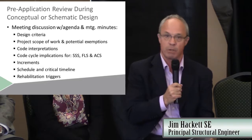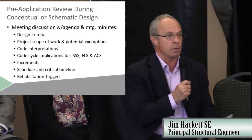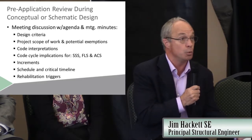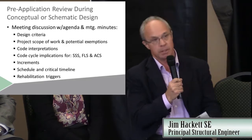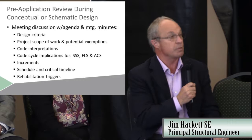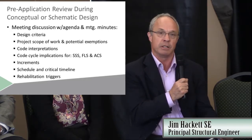Jim, do you want to explain the difference between the administrative and the technical side for some folks that don't understand that? Okay. The administrative code side, as Dan mentioned, is how we process. There may be requirements for the architects, the school districts, project inspectors and contractors, what they have to do in terms of submitting a project and getting a project certified in the end. Those are the general requirements of how to operate. The technical requirements of the building code, which would be your chapters of parts 2 through 11 or 12, are the technical requirements: what the structural regulations are, what the architectural requirements for access and fire are, et cetera. So that's the difference between the two. The administrative regs go into effect earlier because it helps you in your initial planning and in terms of what your responsibilities are.